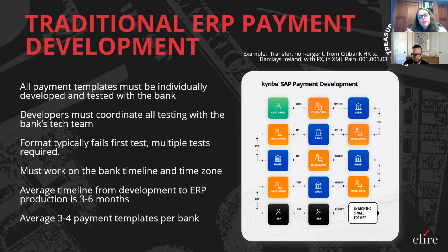Logan spent a lot of time talking about the frustrations with traditional ERP payment development. There are a lot of places where this process can go awry and it can take much longer than expected. Things like you have to work on the bank's timeline, and they want to work with you during their daytime hours, and if they're in China, that's not really convenient for your folks to work in that time zone.